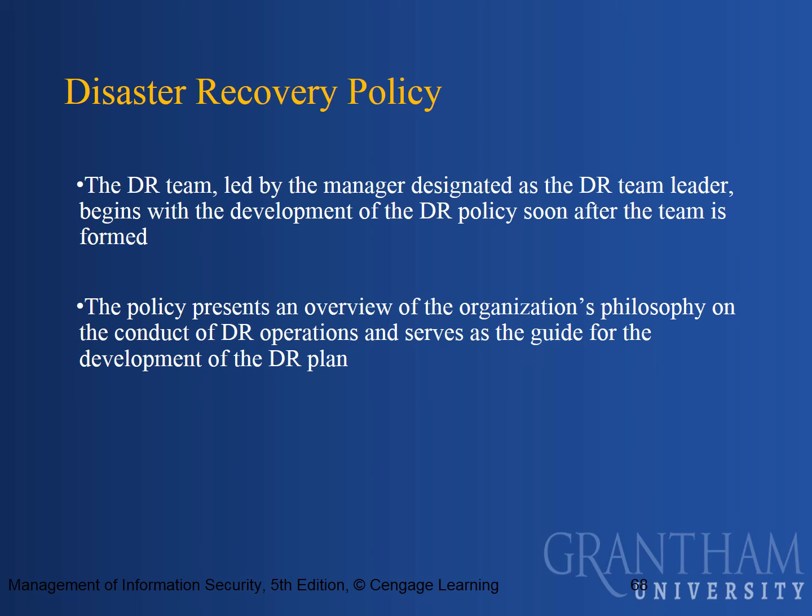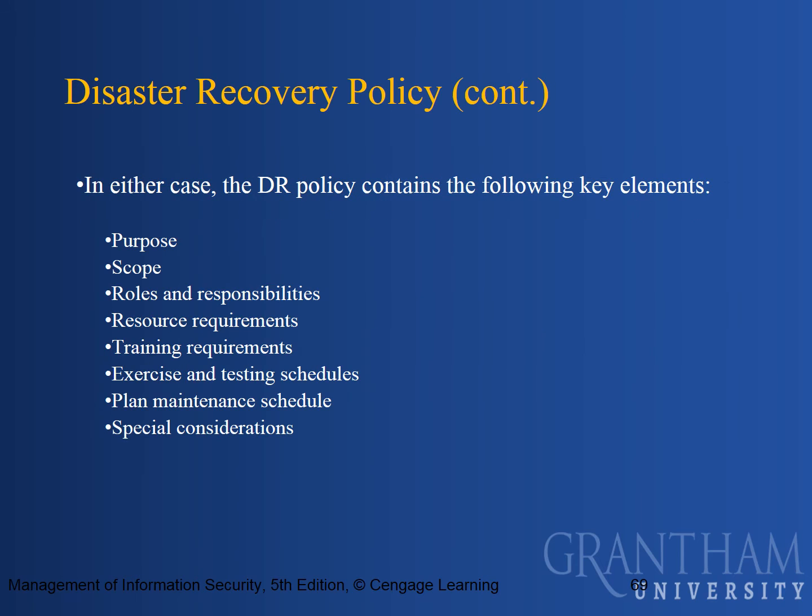The DR policy itself may have been created by the organization's CP team, but it could also be done by the DR team. In either case, the DR policy contains the following key elements: a purpose, scope, roles and responsibilities, resource requirements, training requirements, exercise and testing schedules, plan maintenance schedule, and special considerations.